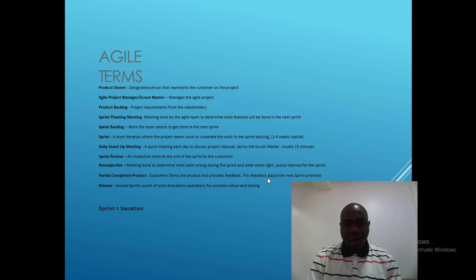If you have work to be done and it's more than 4 weeks, it will be pushed to the next sprint. So this is the incremental way of working in Agile. You do sprints, you work in chunks within a week to a month. You have agreed on some items of work to be done, and you get it done in that period.